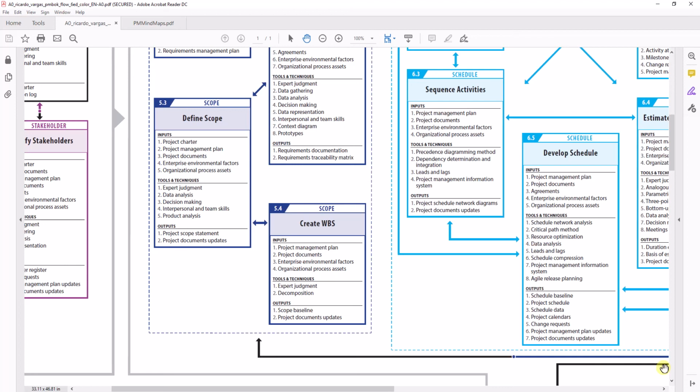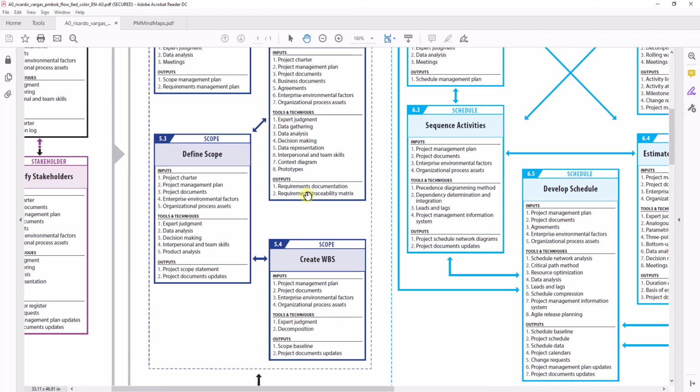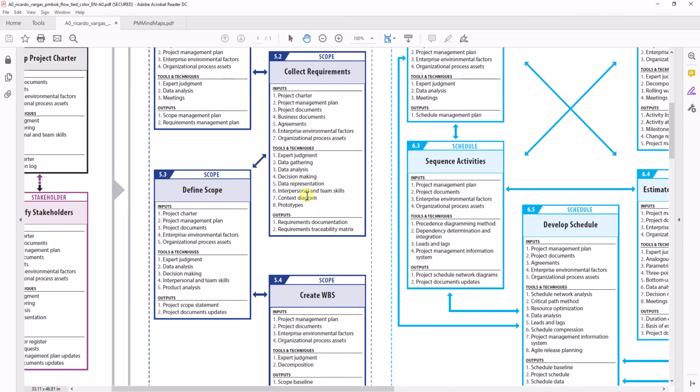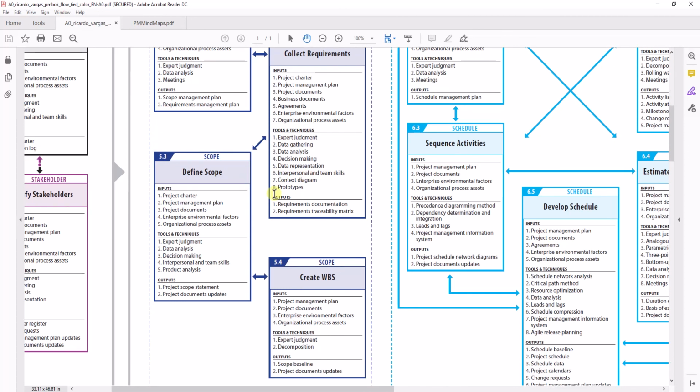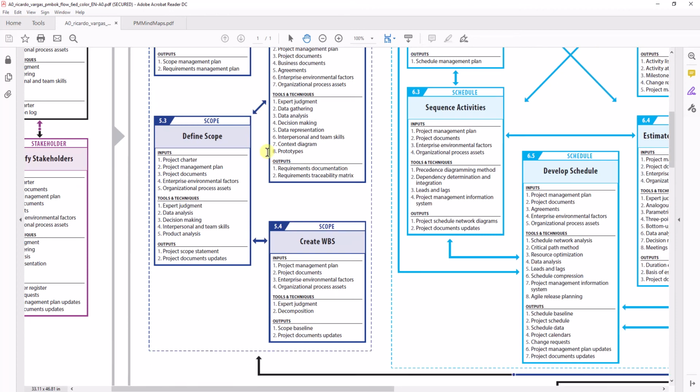So you do voting and categorization, and then you go for the next level of brainstorming only on the prioritized ideas. That technique of prioritizing by voting is called a nominal group technique. These may not be directly listed, but in the exam sometimes they may ask you what the different data gathering techniques and data analysis techniques are.